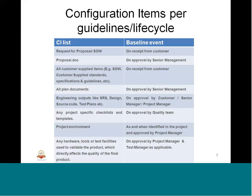We went through example life cycle CIs and various baseline events. For example, the project environment can be a CI. When a new tool, configuration data from customer, or technical documents arrive, they become part of the CI list with their own chain of operations. That is called a baseline event, and a particular baseline event will identify that particular configuration item.